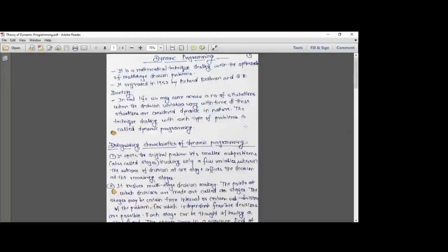Against that investment, we are going to check if it was our targeted investment or not. So is the actual investment equal to the targeted investment, or have we invested more or less? And if we have invested more, what is the reason? If we identify the reasons, we'll try to overcome them, so that for the future floor, for the future milestone, you don't have to invest much cost.